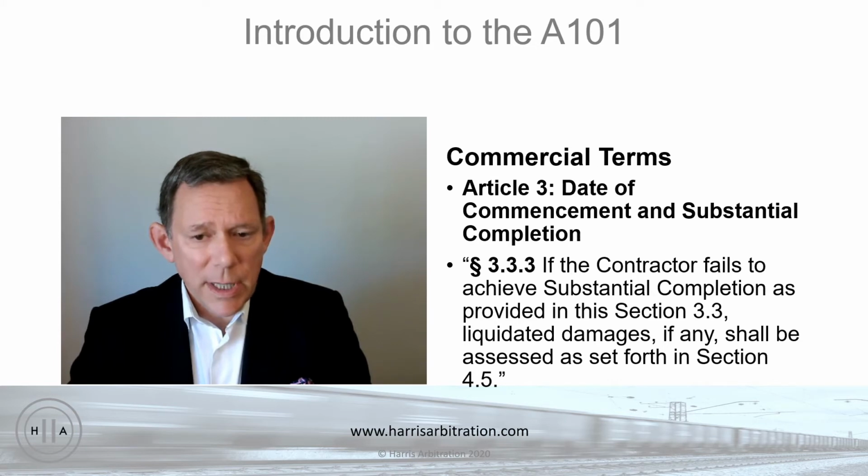As you can see from the text in the slide, the A101 says, okay contractor, once we say go ahead and start the work, which is called a notice to proceed in AIA language, the clock starts running, and you've got X amount of days to achieve, quote, substantial completion. And if you don't achieve substantial completion in X amount of days, whatever the schedule calls for, then you're liable to